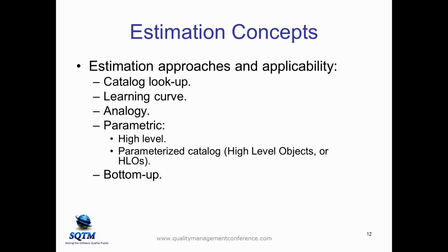Where you can use learning curve for software is things where you have repetitive kind of processes, like for example, let's say that you're using a Kanban type technique or it's a queuing technique to manage maybe your defect repairs and your other maintenance work orders that are coming in for small amounts of work. You know, there are 20, 30, 40, 80-hour kind of pieces of work that are coming in and they're being queued up. Well, maybe instead of doing standard estimation, a learning curve approach might work better there.